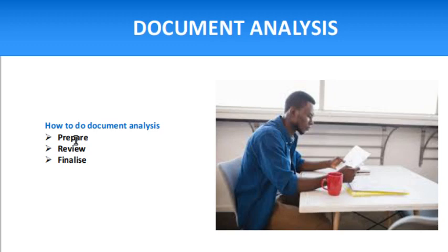the functional specification. You are at the testing stage of a project, so you have to analyze the test cases. You are at the production deployment, so you have to analyze the production deployment plan. So basically it's not necessary that you have to review all the documents in one go. You have to review only those documents which are pertaining to a particular stage of work, then finalize